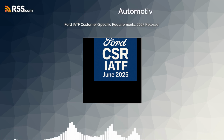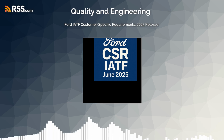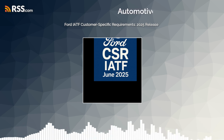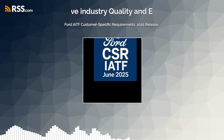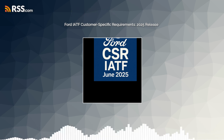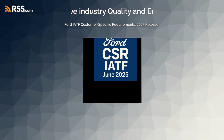And those foundation FMEAs we discussed earlier, this section adds more detail about them being living documents. What does that mean in practice? Yes, it strongly reinforces that foundation FMEAs are required for each process type and are explicitly living documents. The requirement is that knowledge gained from problem-solving activities, like 8D investigations, must be documented and incorporated into both the part-specific FMEA and the relevant foundation FMEA. Both. This isn't optional. It's a core part of their continuous improvement and knowledge retention strategy.